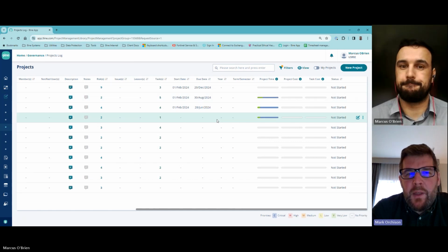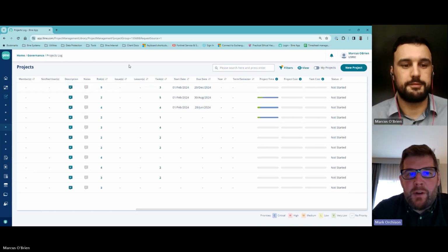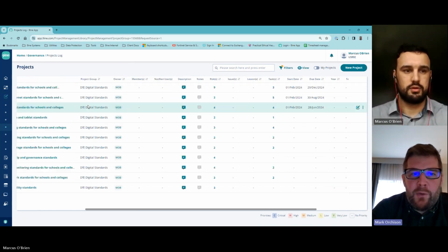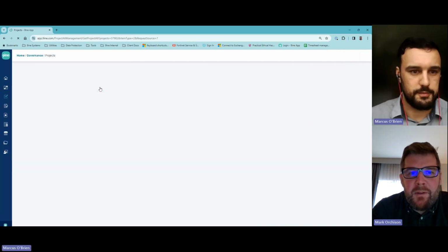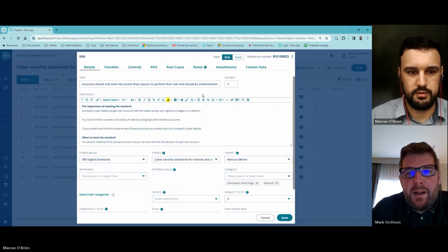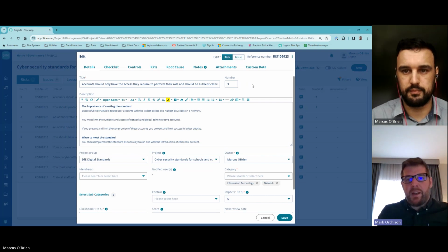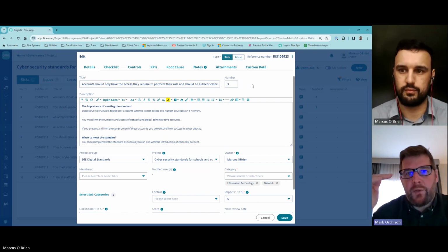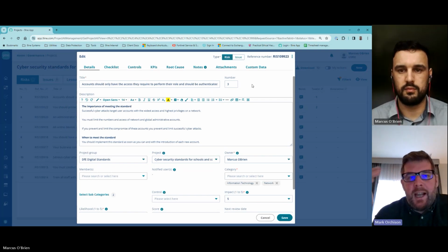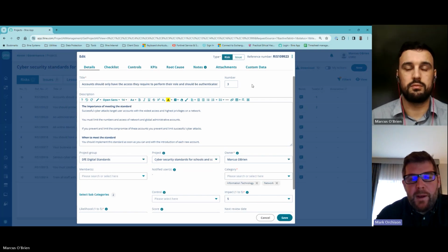Perfect. And the other thing that is useful here, and I know you haven't identified any, is that the requirements could be issues. There could be immediate things that you need to address. I saw the toggle with each of the requirements, so you can identify that as a particular risk, and that would then be reported through as an issue that needs immediate attention, rather than just something that you're dealing with and managing. So again, it helps you categorize where you are against the digital standards, have those conversations with leadership, evidence the work that is required, plan it out, and then obviously close those gaps.